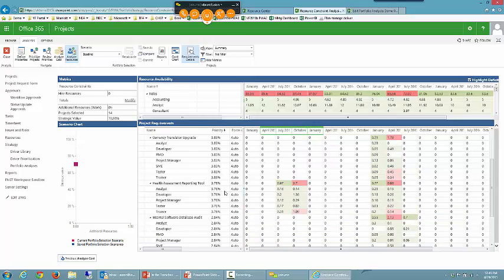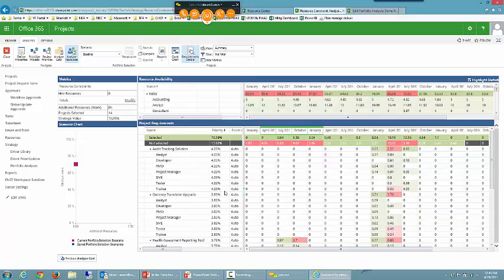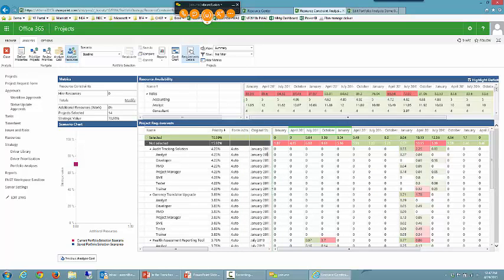Okay, so if I'm trying to get some of these projects back into the mix, there's basically two things I can do here. I can either play around with start dates and hopefully get the resource conflicts that I obviously have resolved by maybe pushing a project start date out a little bit, or I can hire internal or external resources. I can hire contractors or I can hire full-time resources to hopefully get me around these shortcomings that I have here.